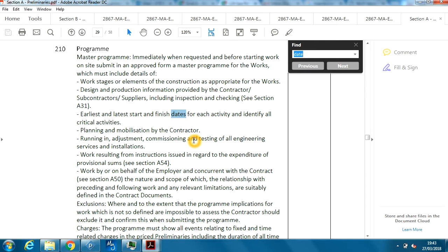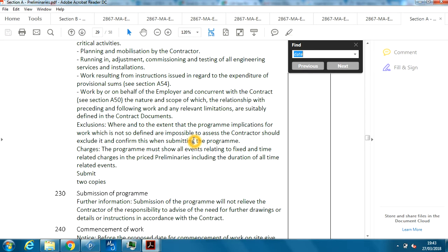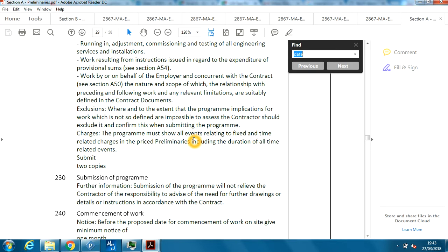So this is why the main contractor would file a compensation event. No, you'll file a compensation event if there is either a variation or it's not your fault. That's if it's deemed acceptable within the contract that the event in question qualifies as an event that could potentially lead to the main contractor incurring costs.